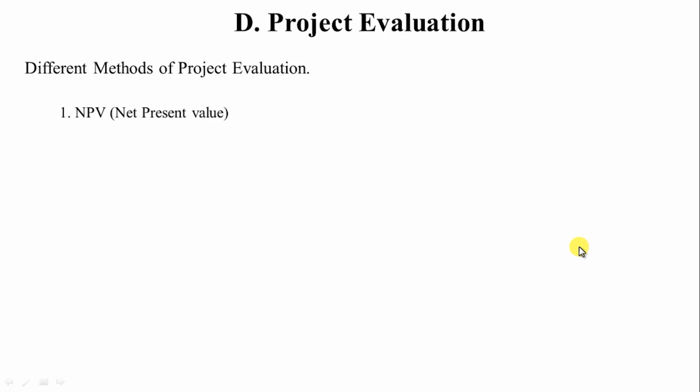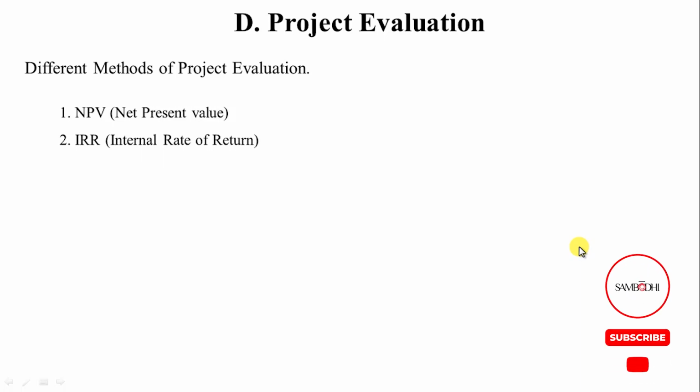The first is the net present value method. Over here, you try to determine what is the net present value expected to come out of the project if it is undertaken. The next is internal rate of return, IRR. This is more of a trial and error mathematical method where you determine the break-even point in terms of percentage of return. You try to determine that percentage of return where all your investment and your inflows equal up to zero, no profit or no loss situation.